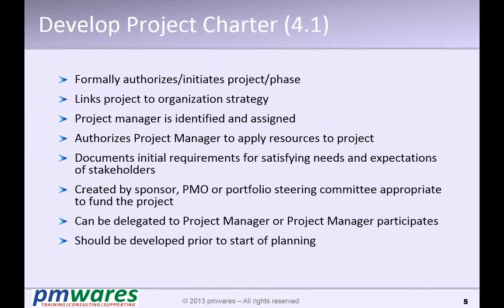So what is developing a project charter? What is a charter? A charter is a starting point of the project. The project manager gets authorized to apply organizational resources on the project. The project charter contains the business case, the reason for the project, the objectives, the strategy, and it often links organization strategy with the project.